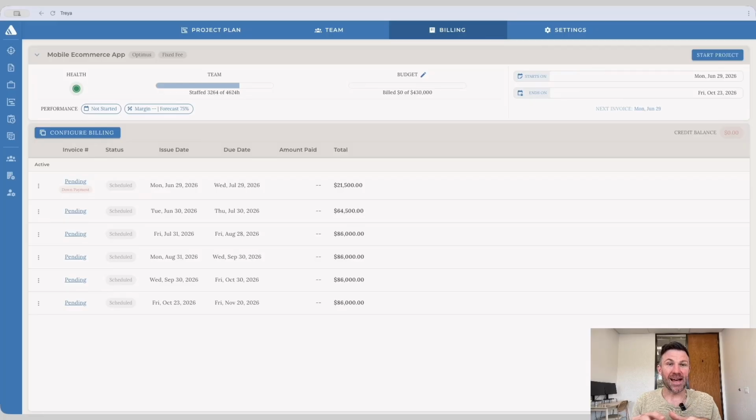Well, all right, it's an exciting day to be a Treya fan because today we're talking about invoice schedules. And invoice schedules are one of those features you didn't know you needed until you used it. An invoice schedule lays out all of the invoices for a project before it ever starts. So I'm looking at a project right now that hasn't started yet, and I can see all 6 invoices that are supposed to go out, when they're supposed to be issued, their due date, and the amount that they're supposed to be for, and they show up as the scheduled status.